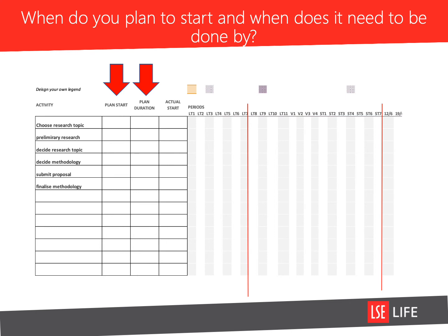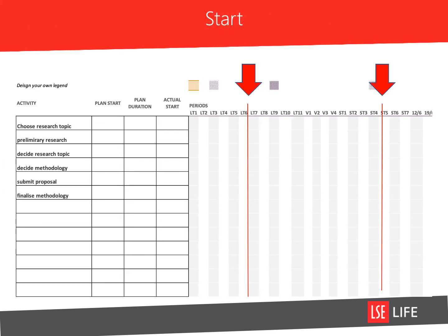Next, you need to set a time to begin and to end each of these project stages. You can add them into the plan here. Then you can mark these across the relevant weeks on the Gantt chart.